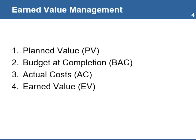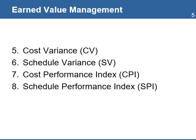Earned Value is the percentage of work completed multiplied by the total planned value, or BAC, at a specific time. Cost Variance is the value obtained by deducting the project's actual cost from the earned value. It shows the variance between what has been completed and the costs that have been incurred.